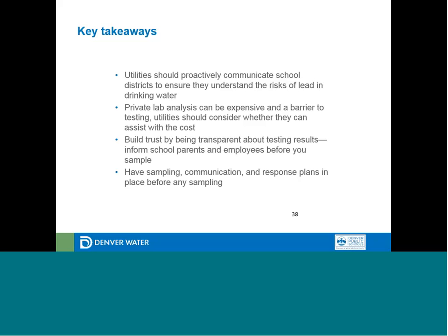It's really a problem when school districts get pretty excited about doing this. They think they might want to test a few schools to see what it's like before they launch into this, before they tell anyone about it, and then all of a sudden it's out that there perhaps is a lead problem in a school, and they're scrambling to react to that. So better to be proactive and get your plan in place and let people know you're going to test in the future than to kind of sample here and there and then see what you want to do.